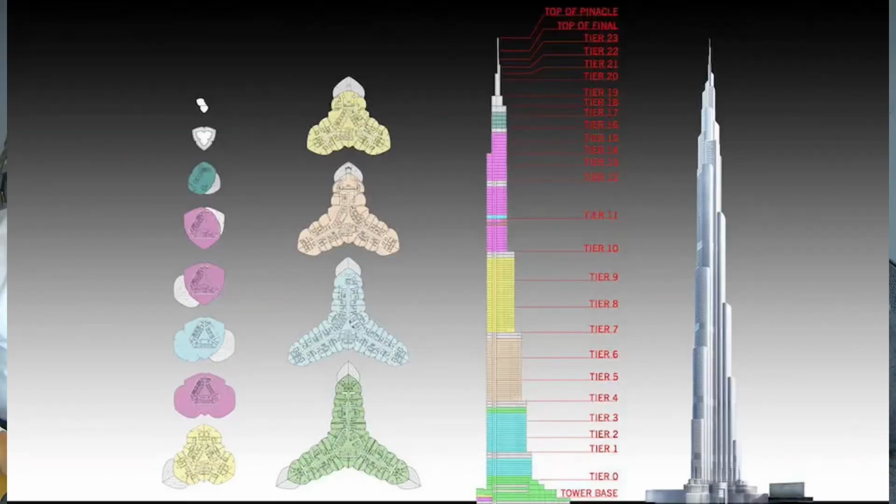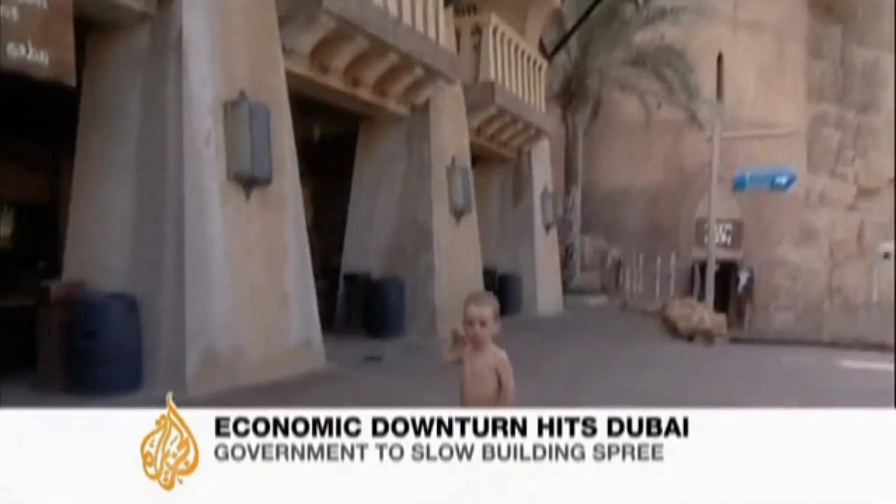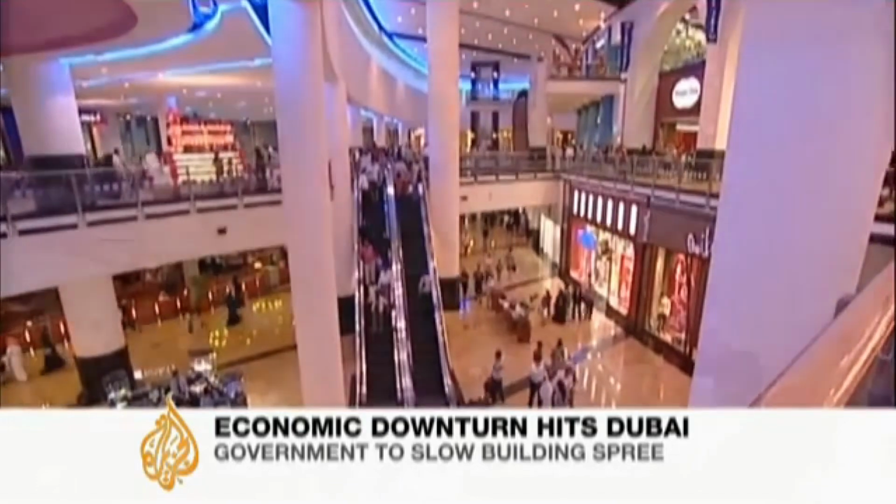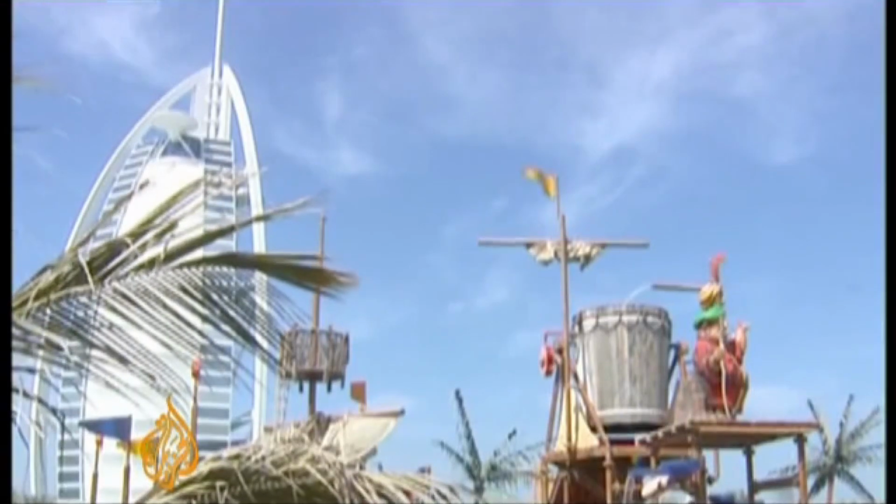Yeah, sure, Rahul. Let's talk about risk management. Risk management was a crucial part of the project. From financial and supply chain risk to technical risk like structural integrity, each stage required detailed assessment. The 2008 financial crisis, for instance, added significant financial risk, and the team had to adjust their budget and shift certain materials to avoid further cost overruns. So this was the financial risk which they faced.